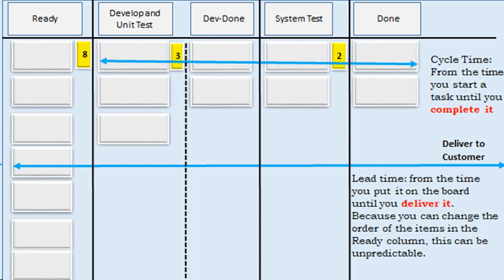When the team has met its WIP limits, the team cannot pull work from the left into the next column. Instead, the team works from the rightmost full column and asks, what do we do as a team to move this work into the next column?